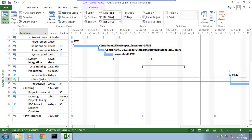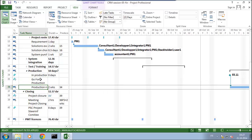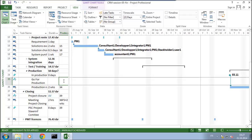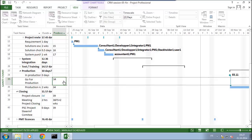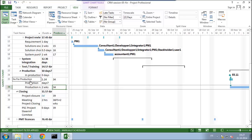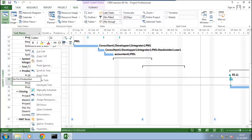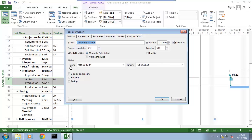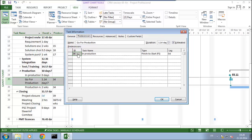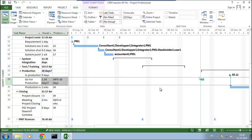I will call this task 'go for production' and set it depending on the production day task, which is number 34. I go into the task information, go to predecessors, and I have defined task 34 'in production' as a predecessor. What I will set here is a lag of minus 10 days — so minus 10d — and we see that we now have a task added which is 10 days before production.